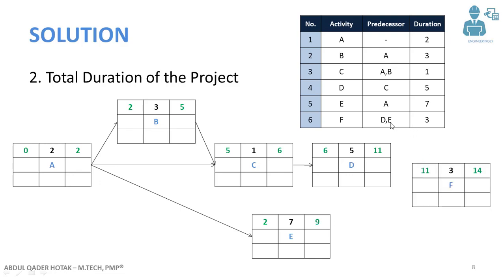Activity F has two predecessors: activity D and E. Both activity D and E must be completed in order to start activity F. As we can see, D and E are linked to activity F. The total duration of the project is the end date of activity F, which is day 14. So the total duration will be 14 time units.